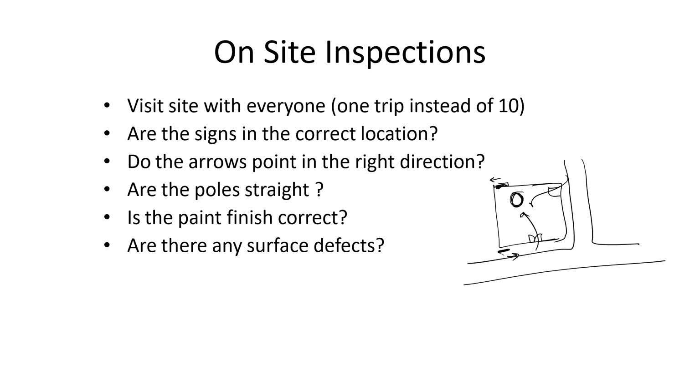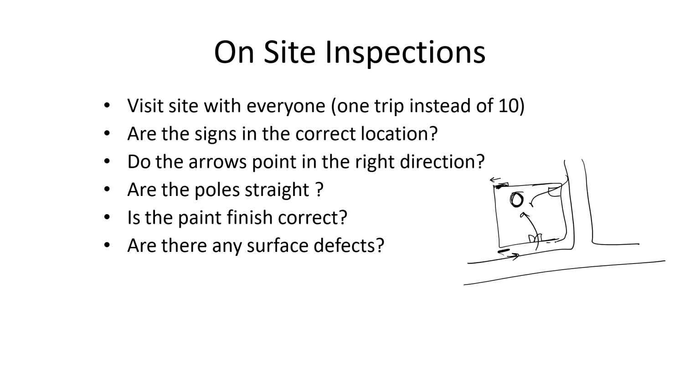So, during this inspection, we need to check especially the directional signs. The chances of putting the directional sign wrong are way higher than for identification signs and even information signs. Identifications are for room identification, so any room we can put this at the front of the room, but still they also need to be checked. We cannot put a female washroom signage on a male washroom sign. So, such kinds of inspections have to be done very properly.